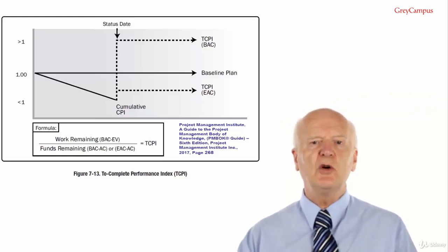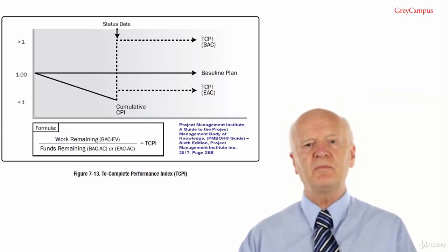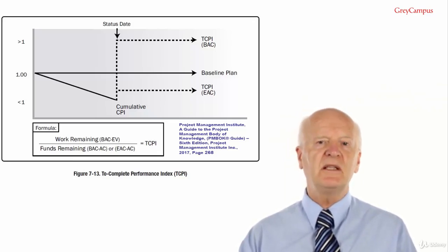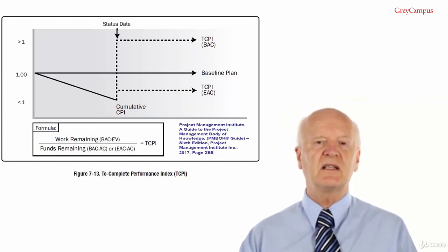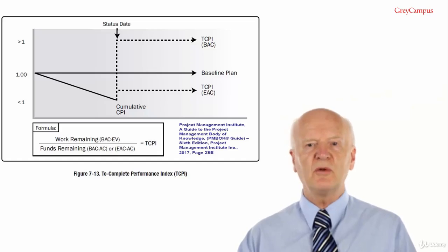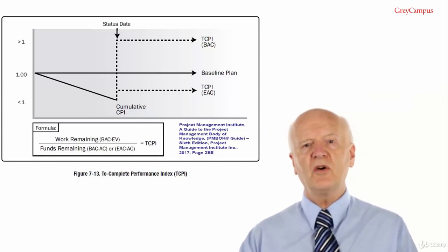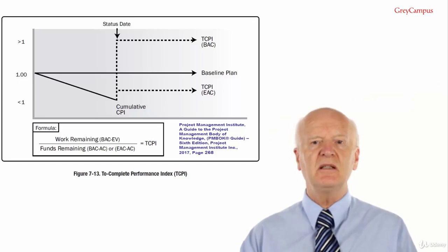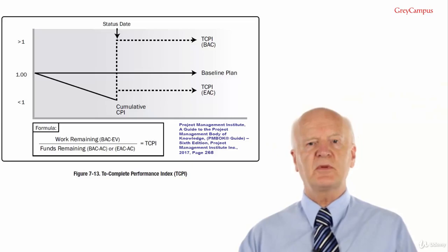As the project has progressed, we have routinely measured the Cost Performance Index, the CPI, and as I mentioned before, a negative CPI is a difficult one to recover from. And if the budget at completion, the BAC, is no longer viable, the project manager should consider using the forecasted estimate at completion. But at any point in the project, the To-Complete Performance Index, TCPI, tells us from this day onwards what cost performance index we have to maintain to reach our goal. Think of it like driving a car. You have to drive 2,000 kilometers in 2 days at 10 hours per day.